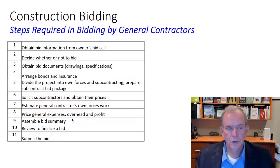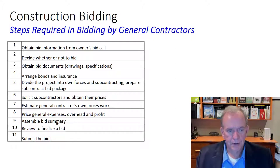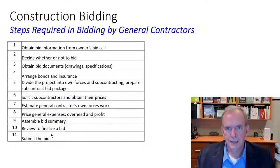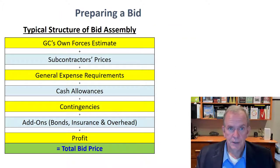You solicit subcontractors, obtain their prices, estimate the GC's work for your own forces and management fees, price the general expenses, overhead and profit, and assemble a bid summary. Review it, make very sure it's correct, and submit the bid. It sounds straightforward but it gets chaotic because there are a lot of subs coming in with last-minute prices, you've got maybe 45 minutes before it closes, you've got to pull prices together and physically submit the bid. It can be a little hair-raising, and mistakes can be made.